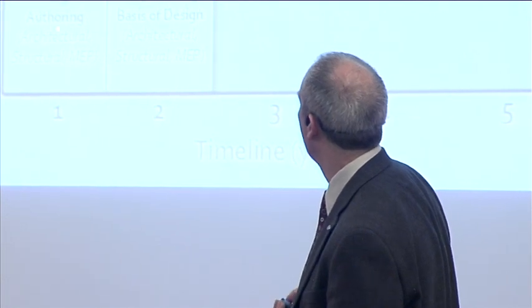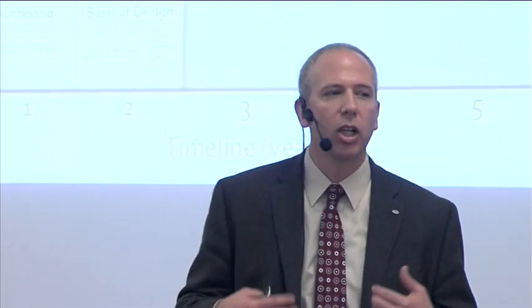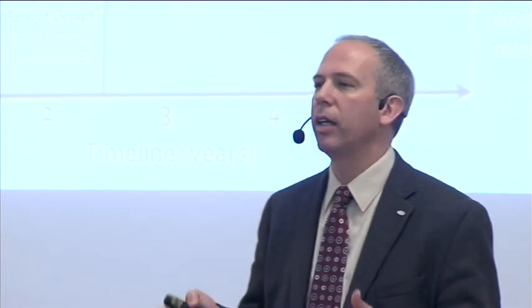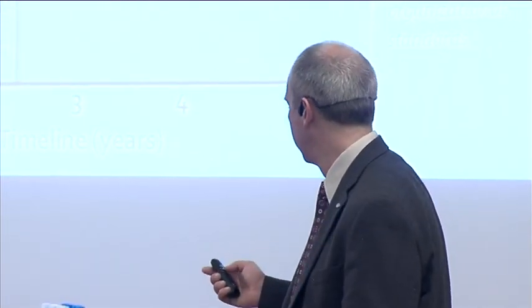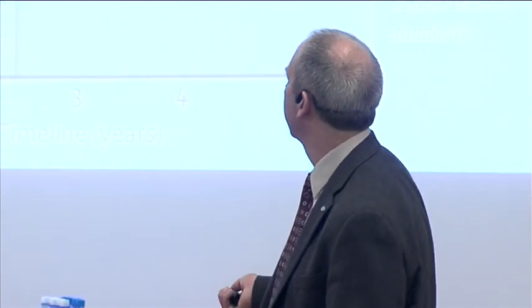For example, in year 1, they wanted people to start authoring the design in a BIM tool, and they wanted to use it for 3D coordination. In year 2, they wanted to use it as the core basis of design, do design reviews, model existing conditions, and start to get some of the record models. So they were looking, over a timeline, at how they were going to implement BIM on their different projects.